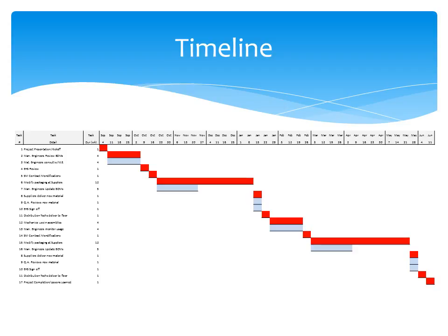The very first step is the kickoff project presentation that I'm recording for you now, followed by engineering review, and then contract modifications from supplier management, and then modifying the packaging at the suppliers. And that's really the longest element within the timeline.